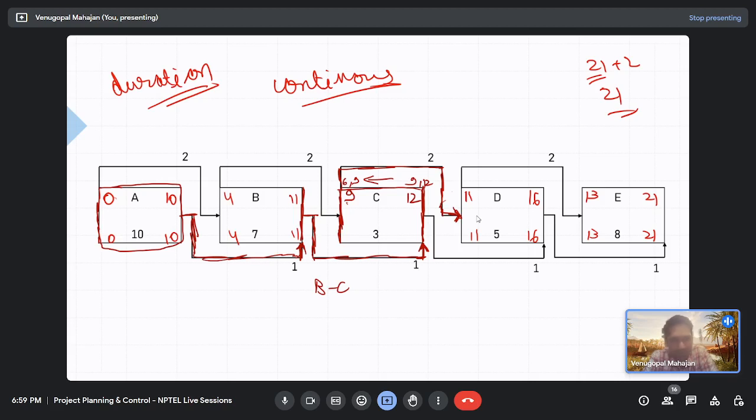I will repeat the hint. The answer is in front of you, clearly written. It is because we considered these activities continuous. If we split the activities, it would not have been so. So we would try to split the activities now. What do you think? If we split the activities, will the total duration remain the same, increase or decrease?